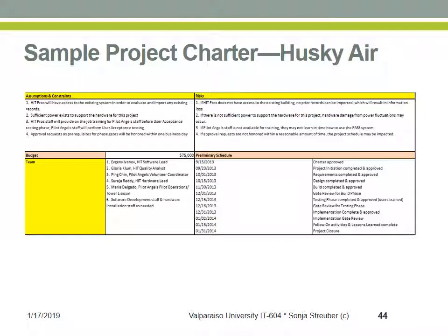Risks, of course, are the things that could potentially go wrong in the project. And as we identify initially the risks at the outset of the project, we want to make sure to keep a good eye on these risks and constantly ask ourselves what else could potentially happen and perform what is called continuous risk identification throughout the project. Continuous risk identification occurs throughout the entire project cycle. It starts even before the project charter in the business case formation. And so the risks that you will be seeing in the project charter partially come from the business case even.